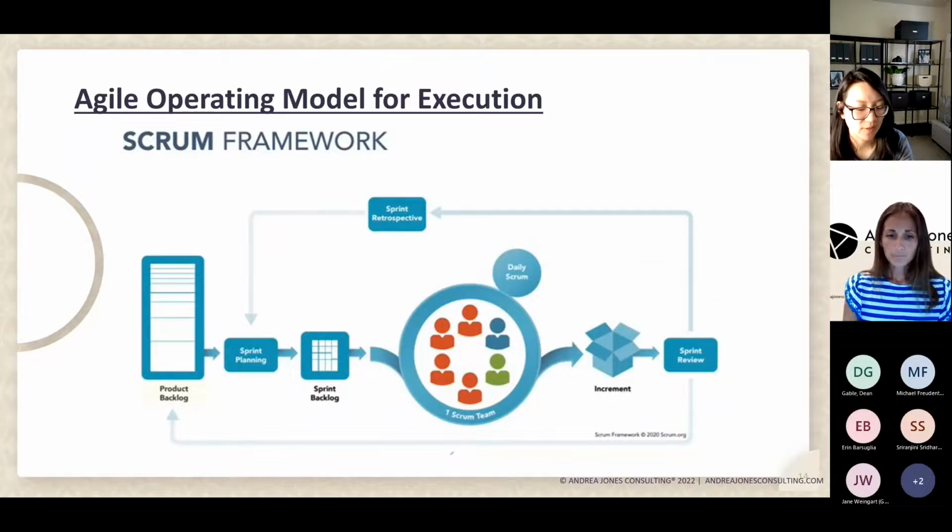Yeah, for the retrospective, I think one other great opportunity that you get out of that is being able to talk about the blockers. So a lot of times I'll see as an Agile project manager, a pattern in certain blockers. And so when I start to see that, whether it's a behavior thing that the team needs to be reminded of, or whether it's an actual blocker that needs to be re-escalated or revisited, or maybe it shows up in a different form, then that allows me to go to the product owner or someone else to escalate and be able to say, hey, this is actually really causing some block for a majority of the team members, like procurement, right? There's this long delay time. How can we make that process smoother on a business level?